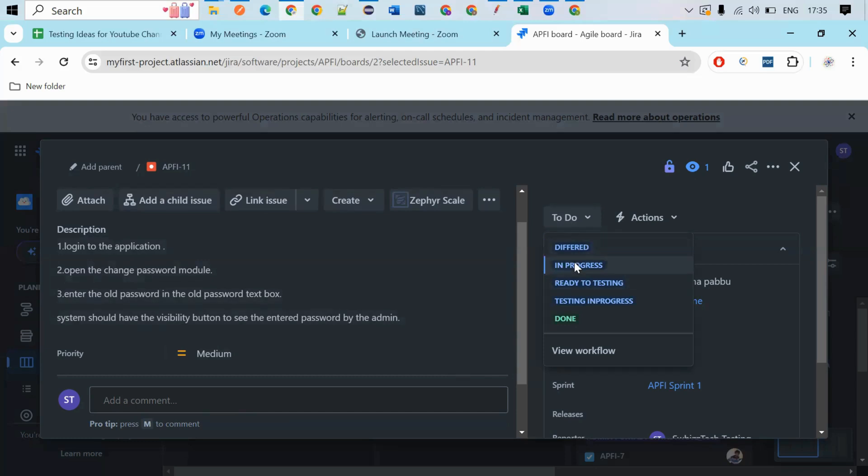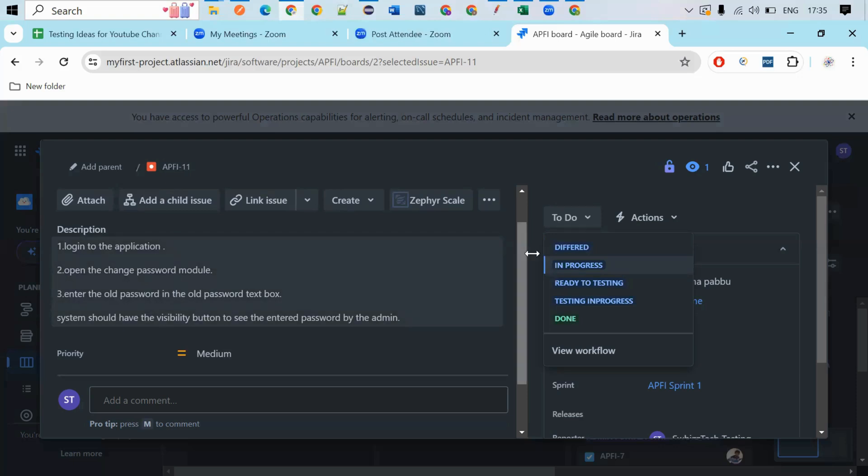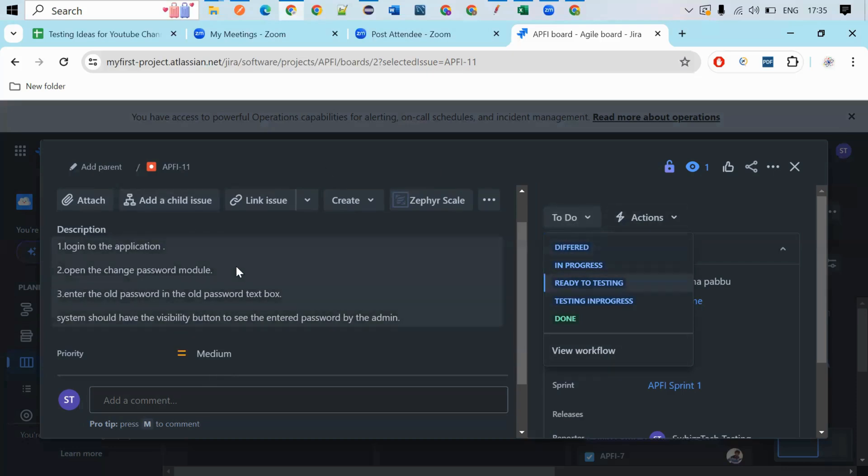So in-progress, if the developer accepted the bug, he will keep that status of the bug as in-progress. If he assumed that this particular bug does not belong to this particular version, he will keep it as deferred. So this is the way they will change the status of the bug.